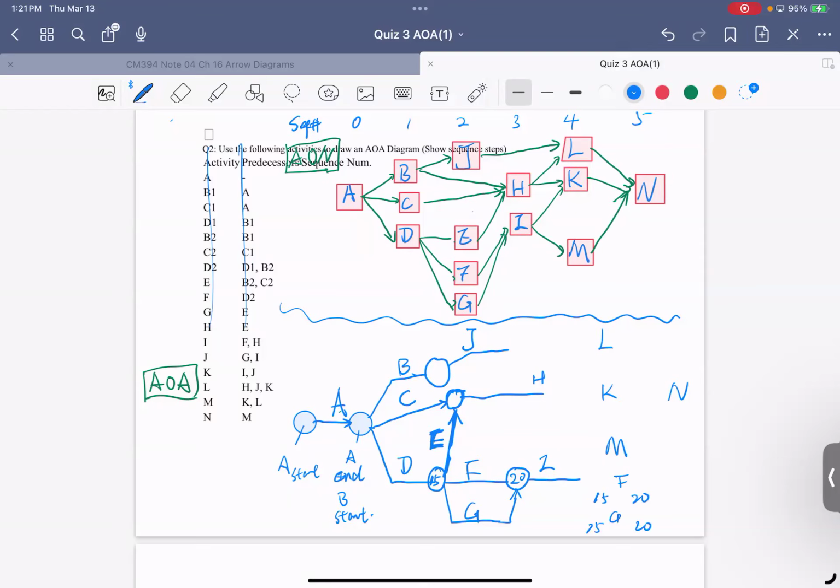We cannot let any combination of this I and the J be the same. So this is a numbering sense. We cannot have any combination like this. So we need to get in our first dummy here, right? Your dummy may be different, but right now you should have a dummy to make sure F and G are different. So we need to break it here, given our dummy. I was using the red for the dummy. So I name this one as dummy 1. Is that okay for you guys?